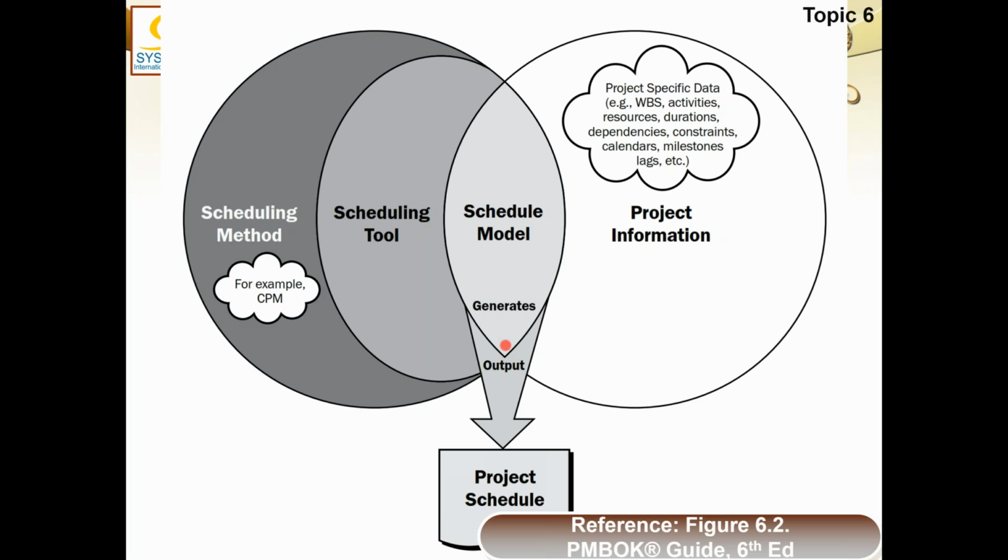Maybe we can do version controlling like this. The very first baseline may be called version 1.0, and the second baseline, the rebaseline, could be called 2.0. And before 1.0, all the various versions of the schedule instances, we could call 0.001, 0.002, and so on and so forth, until maybe we reach 0.100.